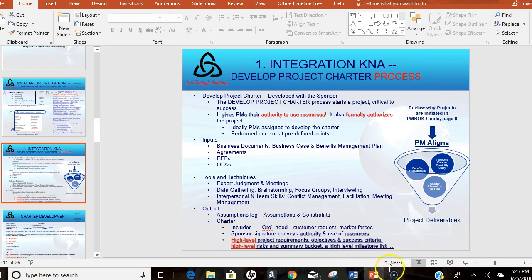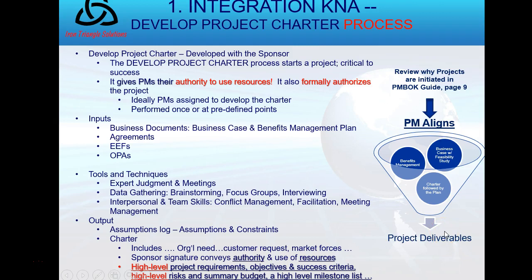Okay, so the very next slide is the actual project charter. The project charter does two things for us. It formally authorizes the project, and it gives us access or authority to use resources. Very important. It is at a very high level, and the project charter is really drilling down from this very, very high business case to a very high charter, to a more detailed plan, and then to execution and changes within execution later.